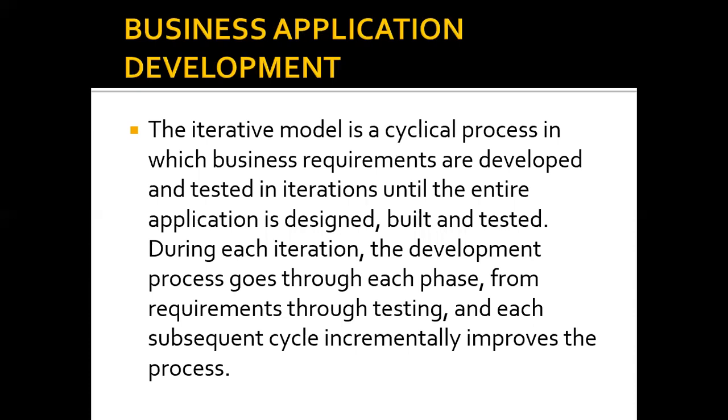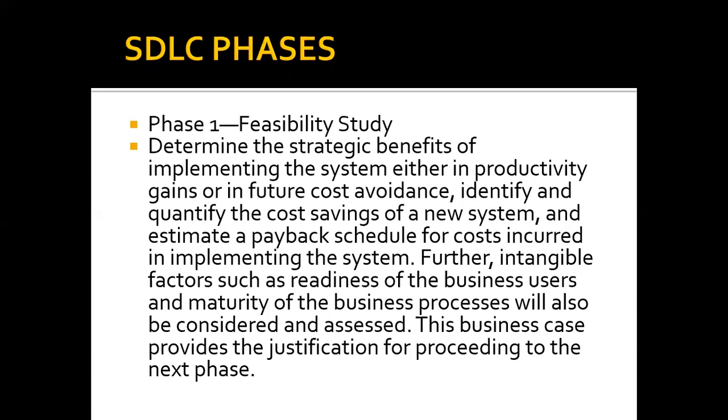So the frequent changes could become problematic, right? Because there could be loss of audit trail, and poor controls can result. Please take note, agile method, prototyping, all right? All of those are iterative models, and of course, the risk is that the frequent changes may lead to poor controls.